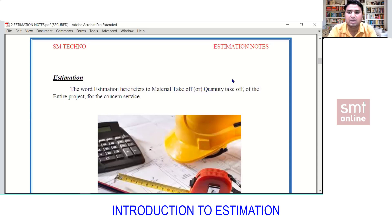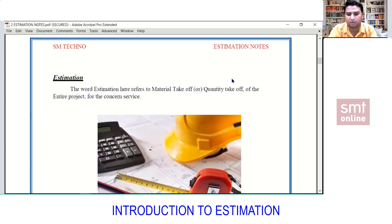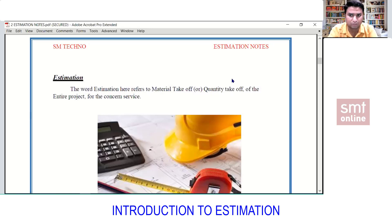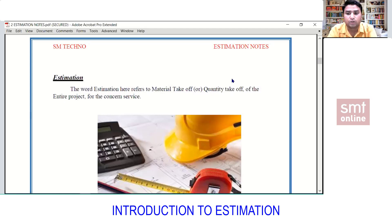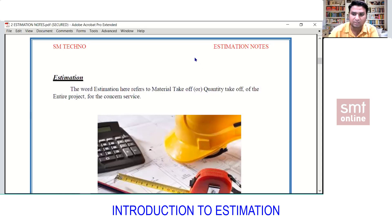Based on the design drawing, we extract what has been shown. For example, if there are many pipes of different diameters, I'll extract each pipe by length — say 200 meters of one diameter, 115 meters of another. I need to extract each one and verify: how much has been quoted, how much I got. We count each single item, cost it, and arrive at the total project price.